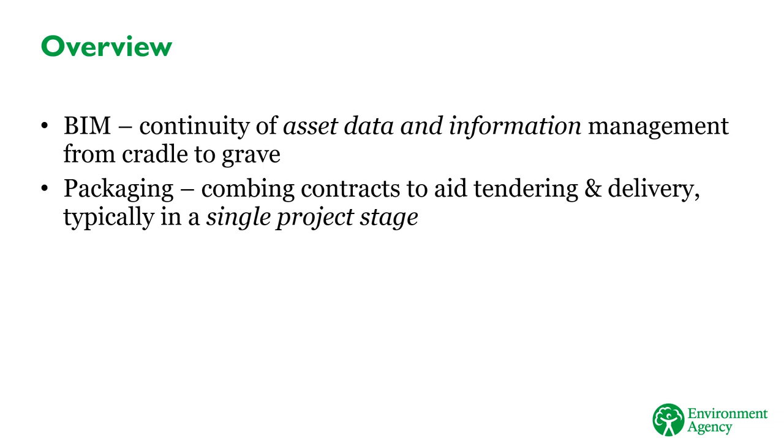Packaging arrangements typically combine projects at a similar stage. For example, packaging together the appraisal stage of a number of projects. These arrangements also typically persist only for a single stage. Once the work on our theoretical appraisal package is complete, the package is finished, and the projects in that package could be packaged differently in the next stage.